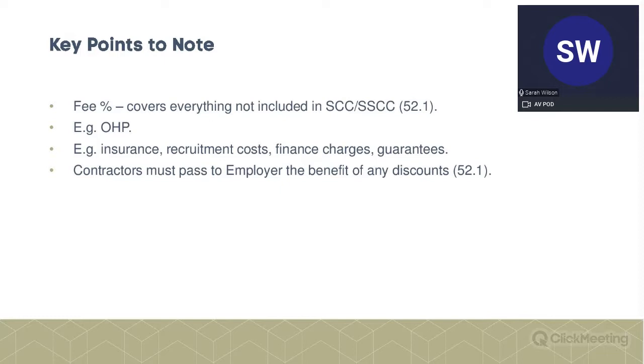We're going to touch on this as we go through the webinar, because it is relevant to consider for both types of contracts. When I'm talking about types of contract here, I'm talking about whether you're on A and B, so this is really only relevant to your compensation events. But it's really important if you're on options C, D, or E, and particularly E, because this is what you're going to get paid, or, if it's not done properly, what you're not going to get paid.